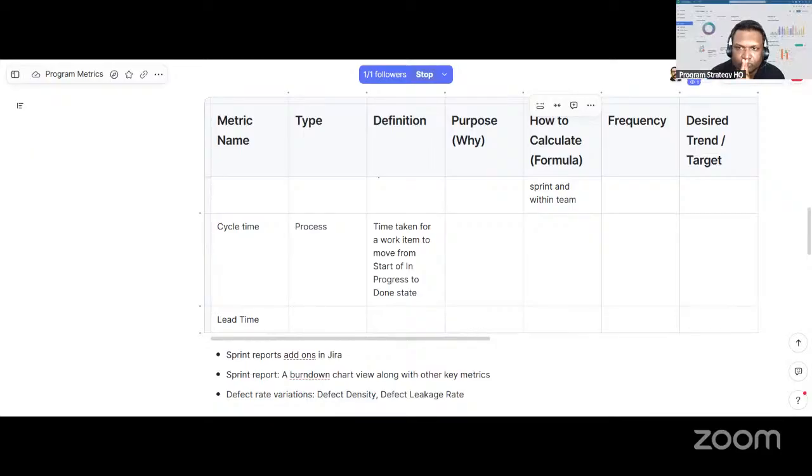So sometimes cycle time can also be delayed in moving from in progress to done if you have review, because normally our architect does the peer review of the things. If he's busy and it has piled up in his sprint board, the cycle time will increase. Excuse me, I have a call.